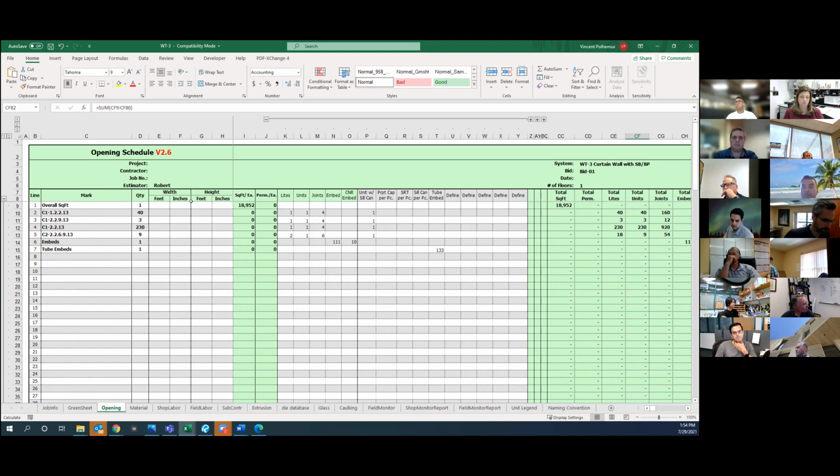I think it's all about moving things to the source. How much of these things can we move to the source so we have a plan? Then when it turns over to the PM, it's about executing that plan. And when things change, why did they change? When you need to do the pallet schedule differently than what was figured up front in pre-construction, why did that change?